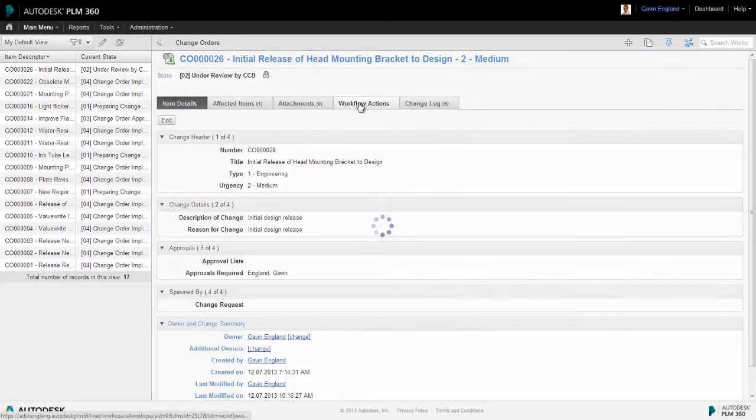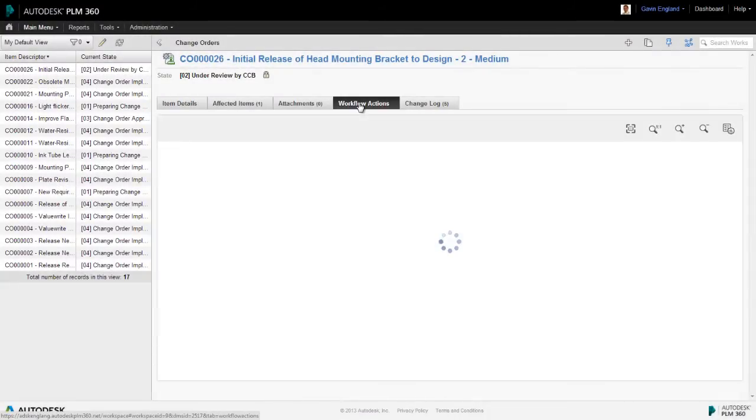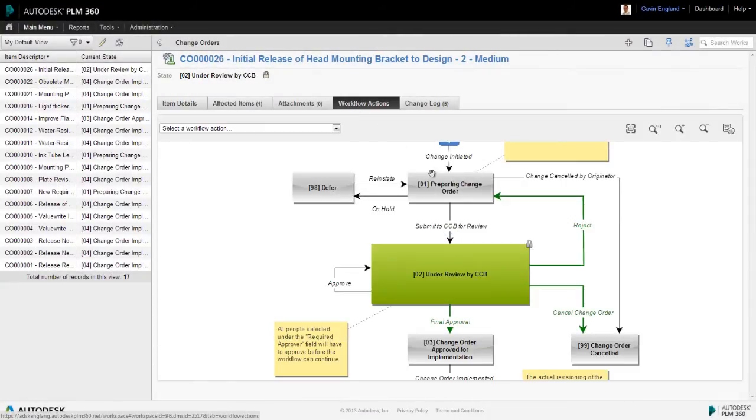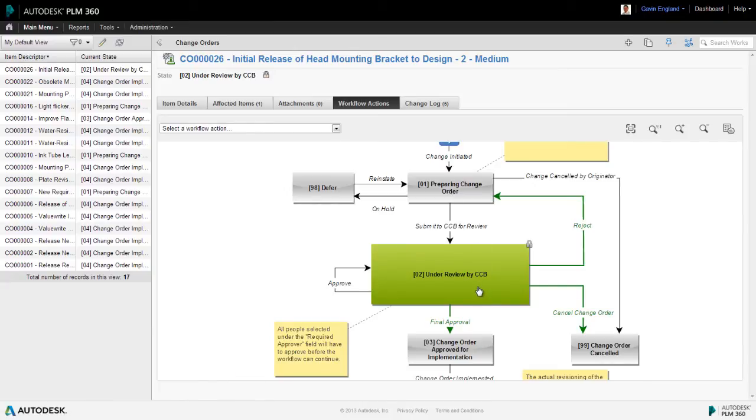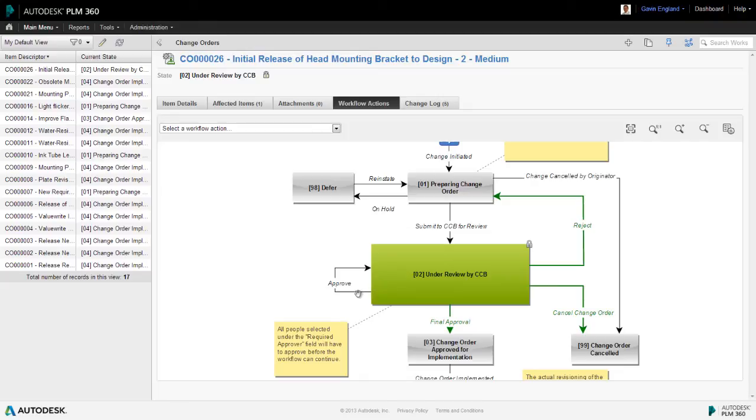So, we're at the review stage of the process and now all of our approvers can either accept or reject what we're proposing. If there were more than one approver and they were all happy with the change, each one would need to sign off the approve action and the process would cycle around until there was one approver left to decide.